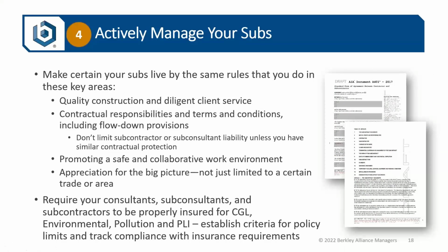So a critical issue for general contractors and construction managers that are constructors is making sure that your subs live by the same rules that you do under your owner-contractor agreement and the general conditions. Philosophically, as well as practically, you want to be using subcontractors that are providing quality construction and diligent client service. We want them to stand behind their work, respond to your schedule needs, and your realistic demands. Contractual responsibility and terms and conditions must flow down to your subcontractors.